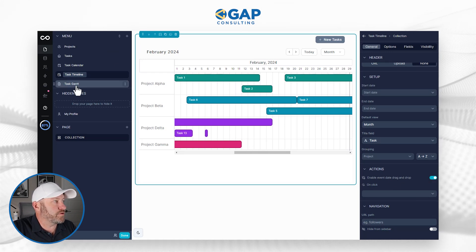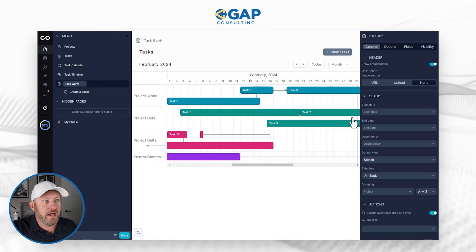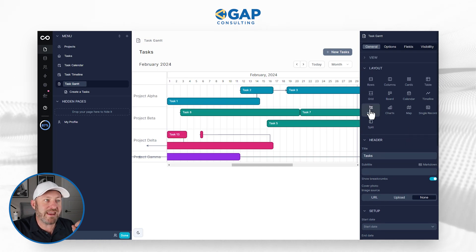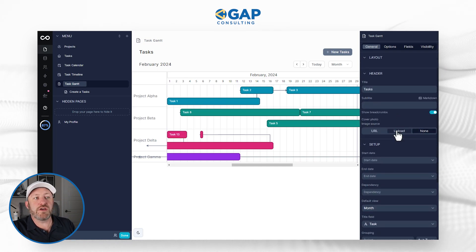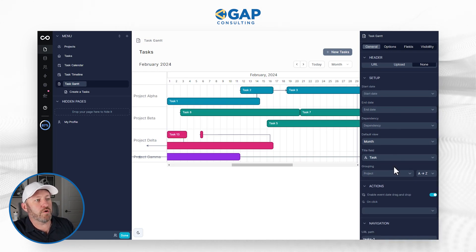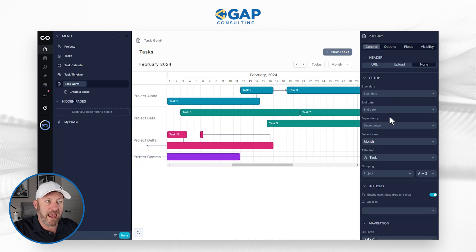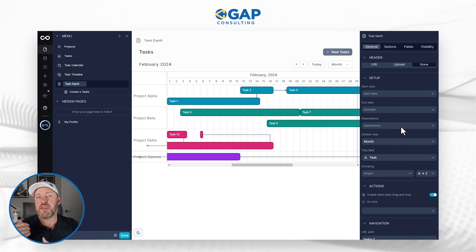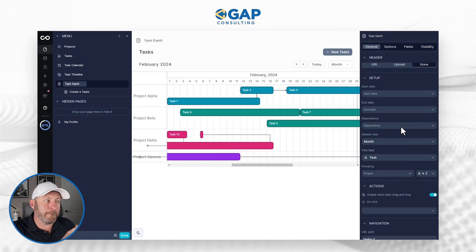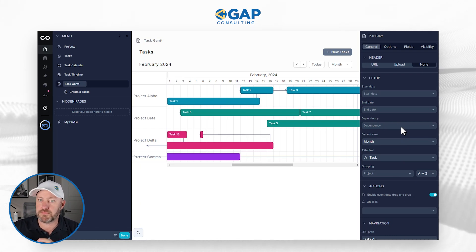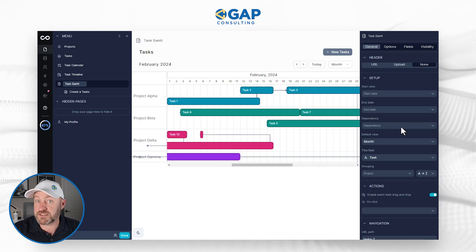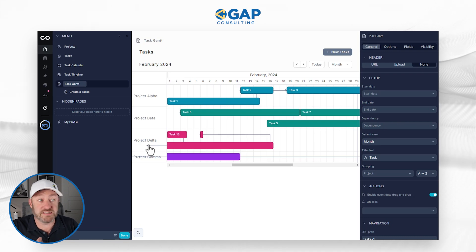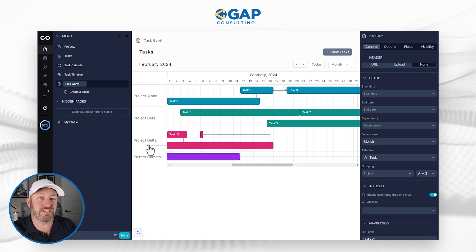Lastly, let's look at the Gantt. We select the component and choose the Gantt layout. It has the same components — start date, end date, default view — but the unique element is the dependency field. This is where we map what a particular task depends on, something that preceded it. That's where we get those dependency lines on the chart, and it's ultimately what makes it a Gantt chart rather than just a typical timeline.